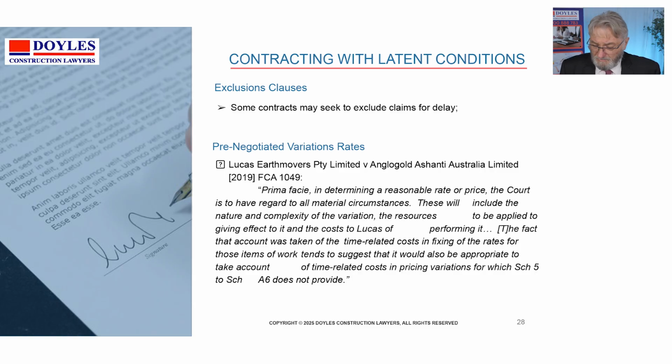So if he only pumped out a small amount of water, then of course he didn't make much money, and probably he lost money because the pumps to set up, etc., would cost more than, say, $1 a litre. But in his case, the water rushed in, and it rushed in like gold because he charged gold for pumping it out. And because he could, with the volume of water that was incoming, he could put on a massive pump to pump at a massive rate and make a substantial amount of money.